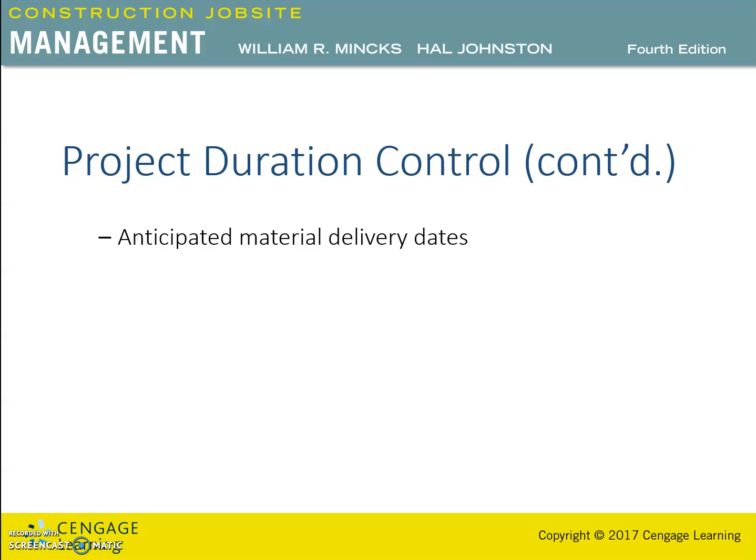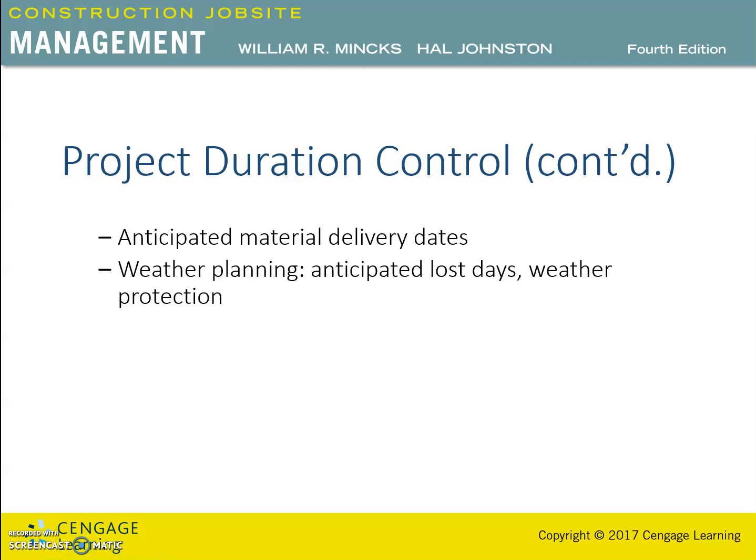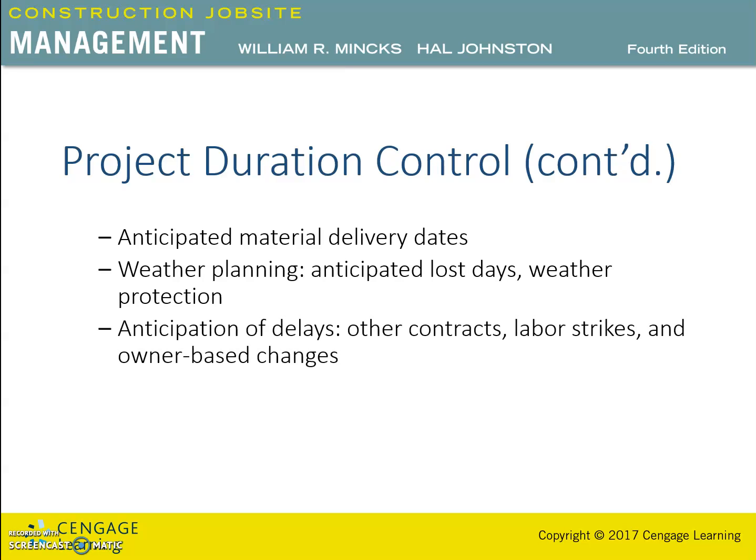anticipated material delivery dates, weather planning, anticipated lost days, weather protection, anticipation of delays, other contractors, other contracts, labor strikes, and owner-based changes. Alternative solutions to sequencing. Therefore, a careful analysis of the entire project is needed to tie activities together to form a plan and subsequent schedule.